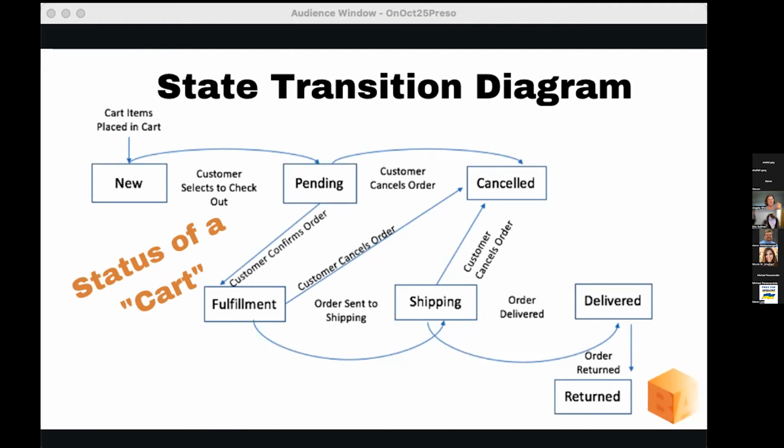So, okay, we've got statuses and we've got user actions. If we do this, we start to go, wait, do I even have all these user stories? Do all the phrases outside of the boxes have user stories from different perspectives of the different people and users involved? And does my acceptance criteria state the actual action or trigger that has to happen to flip it from one status to the next?